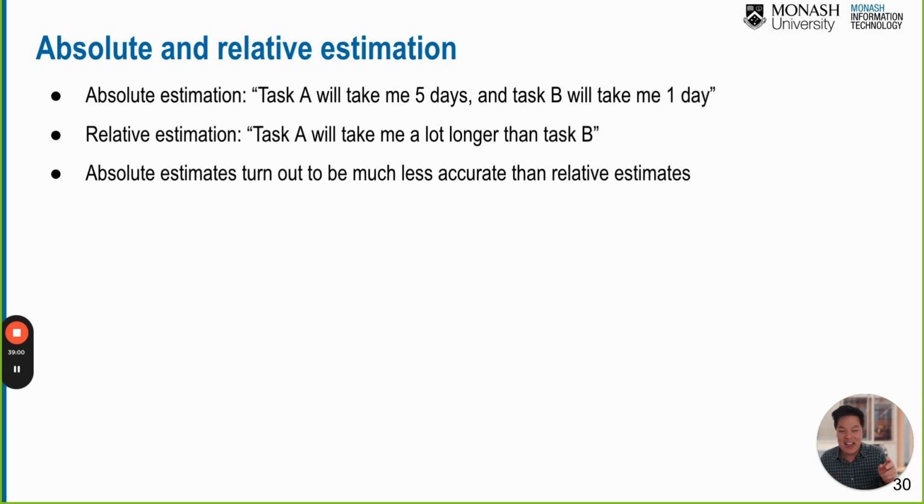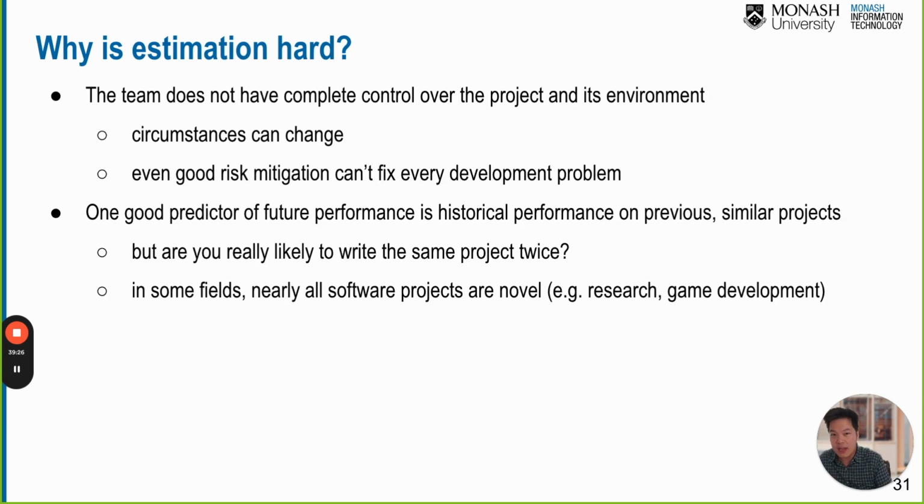If someone says, yeah, this one will take like 7.53 hours, do we really need the 0.53, that kind of thing? At the end of the day, that's why people tend to use relative estimates, okay? That means how many times is required to complete this task when compared to the other one. Is it double the work or triple the work, that kind of thing, okay?